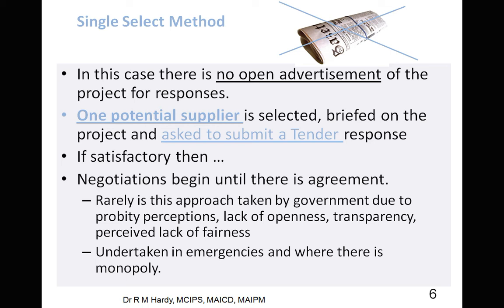Quite often people don't. Quite often people use the tender process as a way of choosing a builder and then negotiating directly with that builder. But that's not technically right, because you then need to appoint the builder according to the tender documents. Yeah, if you change it, you need to be fair to everybody. You need to give everybody the same chance. Okay, now that is the way it's supposed to be done, but I do know that it's not always the way that it actually is done.